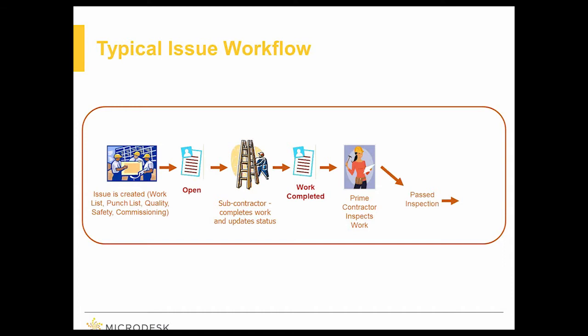And if it is passed, great. It passes, that gets closed. That becomes a part of the project record. So we can track how long it took for these issues to get taken care of. So you can see that and make sure that, okay, these people are doing things in a very quick manner. Great, awesome. Or these people, they're getting things done, but it's taking a lot longer than they said it would or than it should. Again, those kind of things you can track, you can report, and you can see.